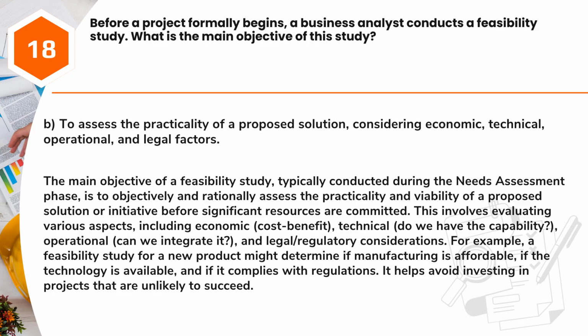The main objective of a feasibility study, typically conducted during the needs assessment phase, is to objectively and rationally assess the practicality and viability of a proposed solution or initiative before significant resources are committed. This involves evaluating various aspects, including economic, cost-benefit, technical, do we have the capability, operational, can we integrate it, and legal/regulatory considerations. For example, a feasibility study for a new product might determine if manufacturing is affordable, if the technology is available, and if it complies with regulations. It helps avoid investing in projects that are unlikely to succeed.